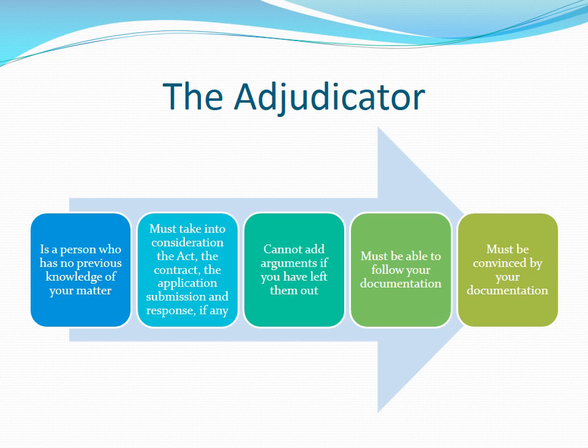Nor is the adjudicator even interested unless it has a direct bearing on the matter under dispute. The adjudicator is bound by the Act, so the only matter under dispute is the payment claim that has not been paid at all or in part.